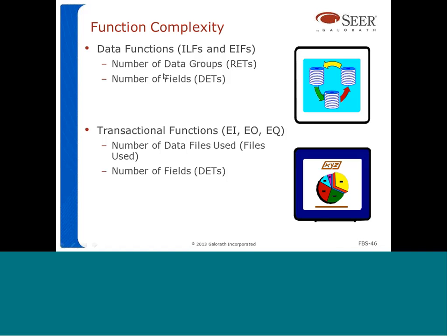The other concept is data fields. We call them DETs, data element types. So the number of fields is also used when rating complexity for data functions. So when you rate complexity for data functions, we're going to identify the data groups inside those data functions, and also the number of fields.